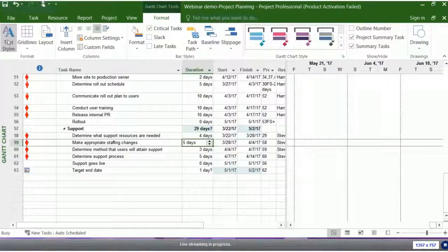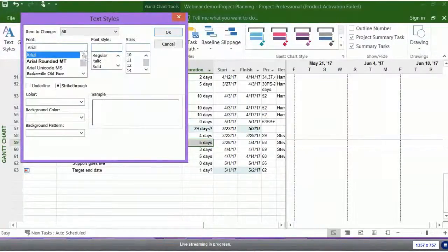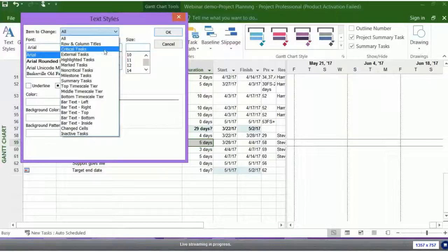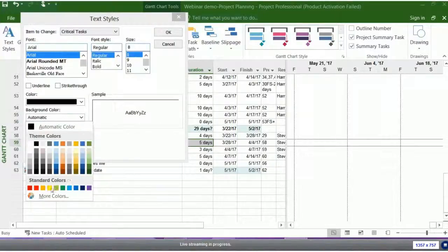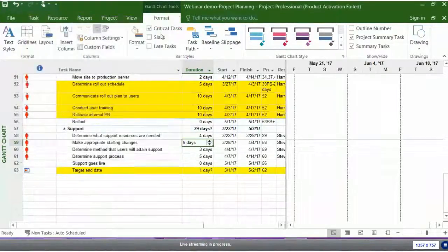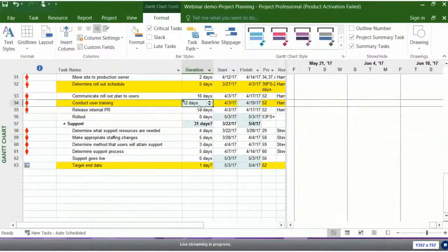and we're going to show, my machine's getting slow for some reason right now, I'm not quite sure. Hopefully it's not about to crash. Okay, it didn't crash, thank you. I'm going to show the type of task is called critical, and the background color is yellow. So there's my critical task. So what happens if I add 12 days? Everything's cool. What about 14 days? That's okay. I added 4 days out of my 5 days of slack.